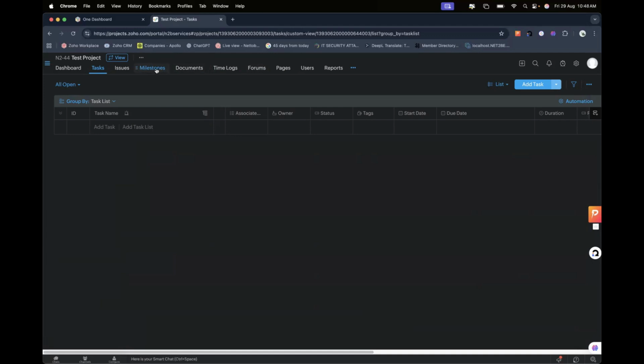Don't forget, we talked about breaking down the project into milestones, task list, and tasks. You want milestones to show significant progress that you're making. For instance, if a project is supposed to be a 2-month project, you might want to make milestones that show significant progress has been made, let's say in the first 3 weeks.